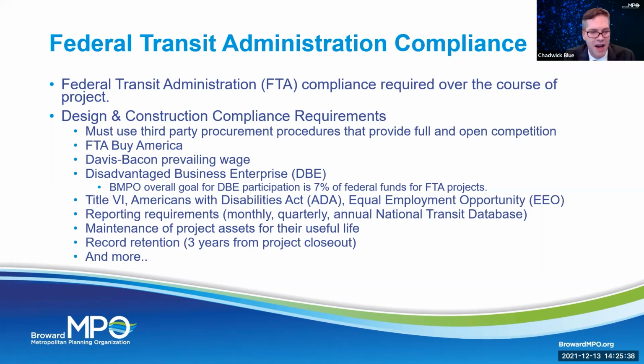And lastly, record retention. You're required by the FTA to keep all of your project records for 3 years after your project closeout. Oftentimes we do it for much, much longer, but it has to be done for at least 3 years. So it's important to remember that in the beginning so that there's no issues later on.